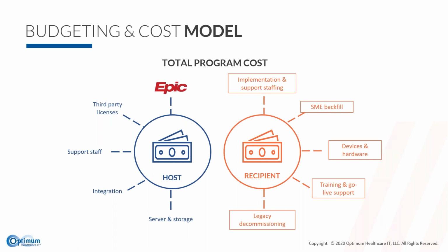There's also the hardware pieces I just talked about. There might be a hardware uplift to get to what you need to have for the Connect install. So it might be end user devices, it could be e-signature pads, it could be making sure you have wireless coverage from a network and infrastructure standpoint, any of those aspects, so understanding those to really get to essentially a TCO.